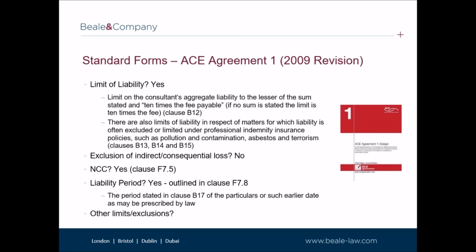The ACE agreement also includes a net contribution clause and a limit for the time within which claims can be brought. In relation to the net contribution clause, this is widely drafted, amongst other things, by extending the parties within the net who may be jointly liable, such as other advisors, contractors, subcontractors involved on the project. The drafting of the net contribution clause in the ACE agreement is therefore preferred in comparison to other standard forms.